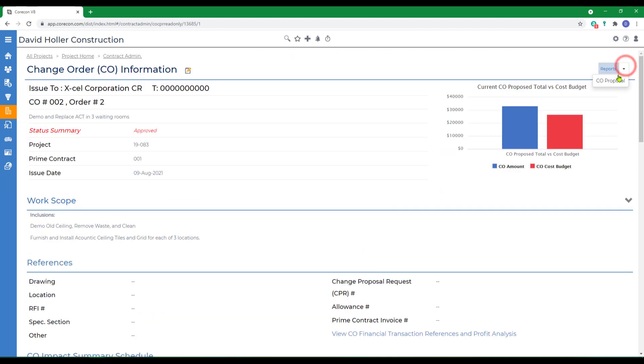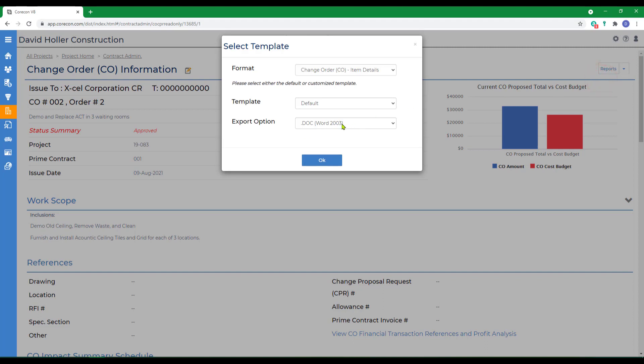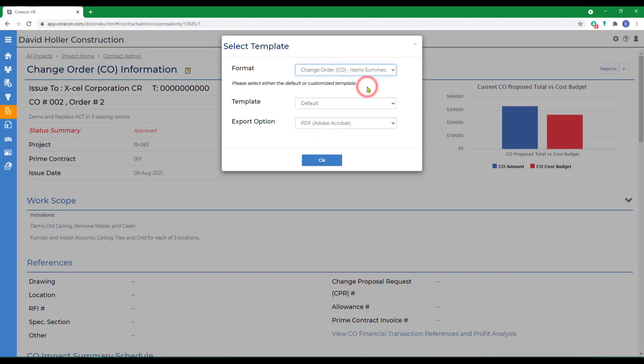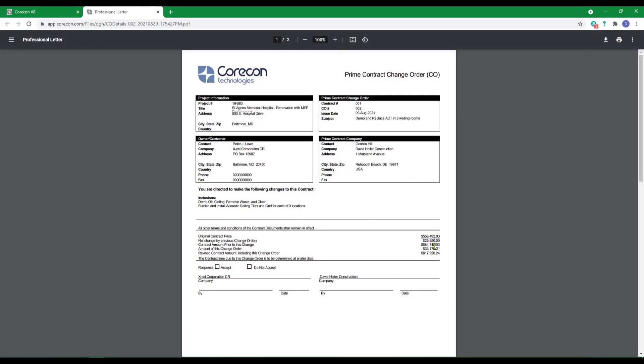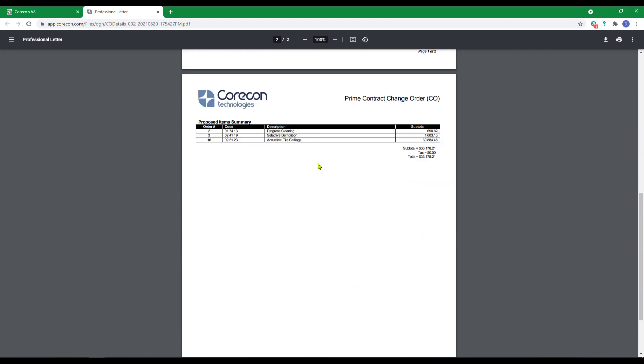We'll go up to Reports, Change Order Proposal. Let's group these by job cost code. Click OK. Again, the first page is a summary of the original contract value, all approved change orders, a revised contract value, the project information, contract information, the customer owner information, place to sign, the second page is the line item details.